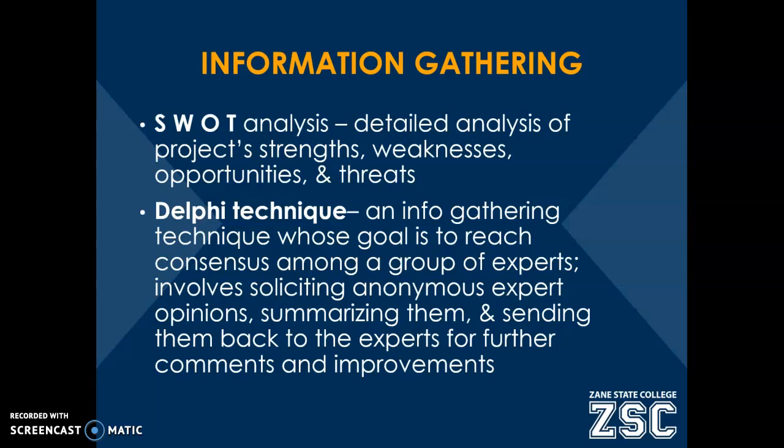Another technique we haven't talked about yet is called the Delphi technique. And essentially this is just going to the experts in a particular field when it comes to identifying risks. So you would want to interview or gather information, perhaps have a meeting with a group of experts, get their opinions. Maybe you interview them all individually and anonymously, and then summarize their opinions, and then give it back to the experts for them to further analyze.